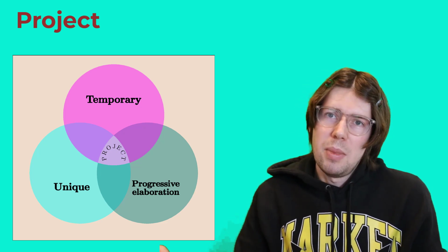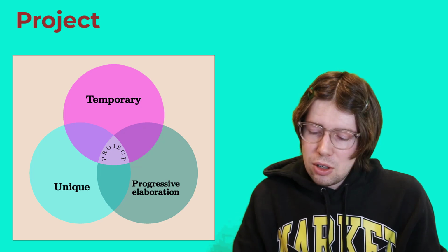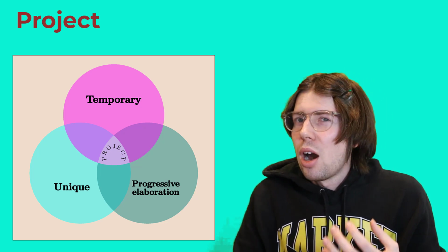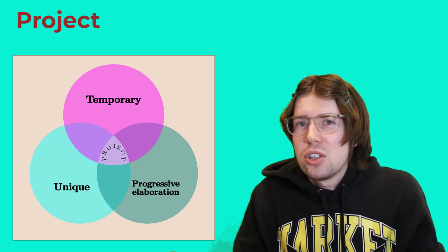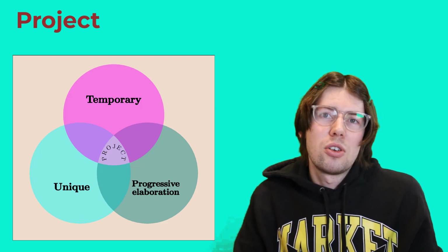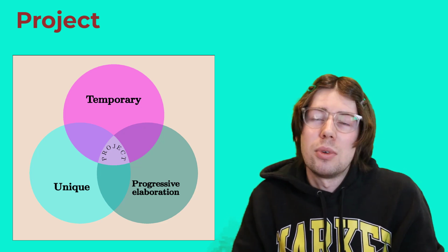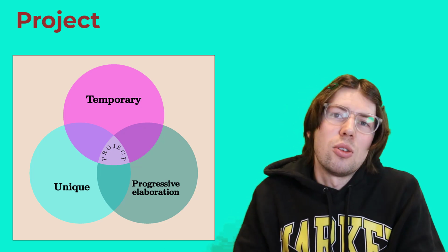So, wind farms. Making and operating a wind farm. Is that a project? Yes. There are some disagreements though in how exactly to put the boundaries of a project. We could say that constructing a wind farm is its own project, and then operating it for 25 years or 30 years or whatever the lifespan happens to be could be another project.